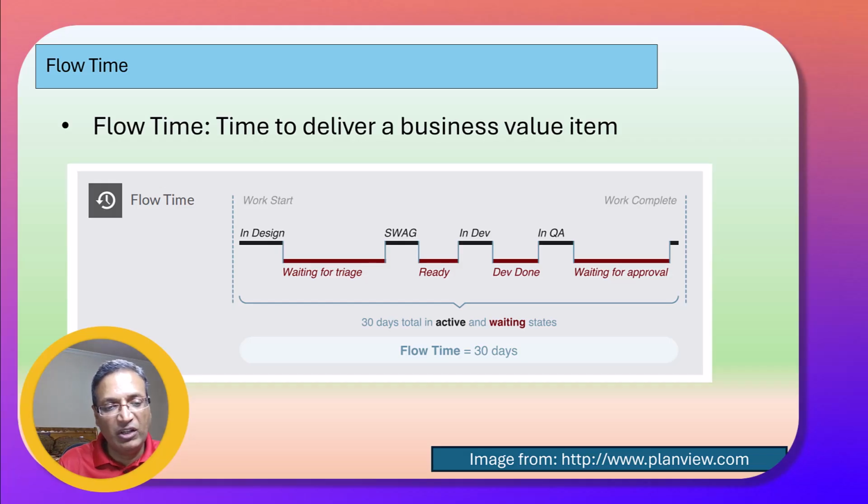And it's helpful to see all this data visually. Now this is for one period, but you want to measure it over multiple periods and see where you land, what the average is. And you want to apply some qualitative measure when you are forecasting, in terms of uncertainty about your product, capabilities needed, things like that. And you can use this as a starting point for your future forecast. So flow time is the time that is needed right from start all the way to the delivery of that value feature to the business.